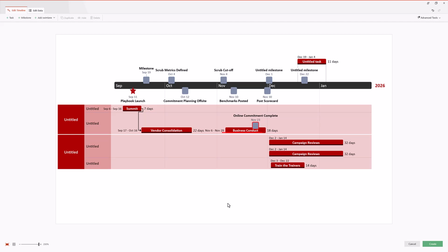But our conditional formatting has also kicked in here to highlight that milestone and that baseline to say, hey, this is red. This has gone behind schedule, or there's been a delay rather. And so that can be indicated. And then conversely, of course, if something was ahead of schedule, our conditional formatting kicks in and that turns green. So a very cool feature, again, only in expert, and there's a lot more that you can do with planned versus actual, just a little bit of a preview there.